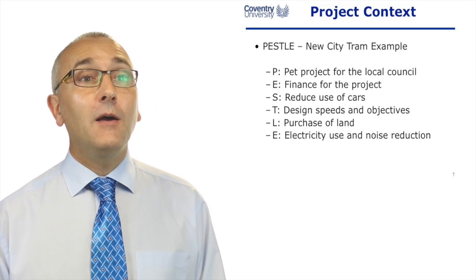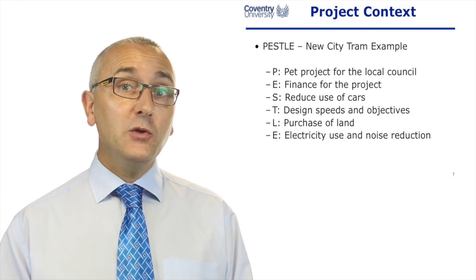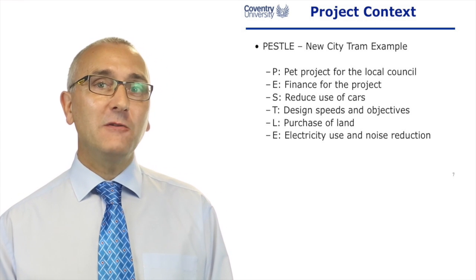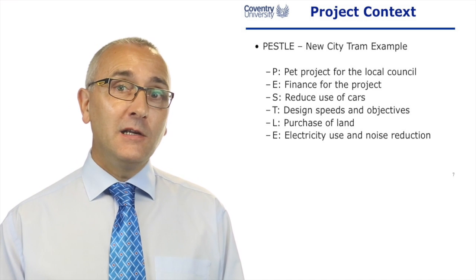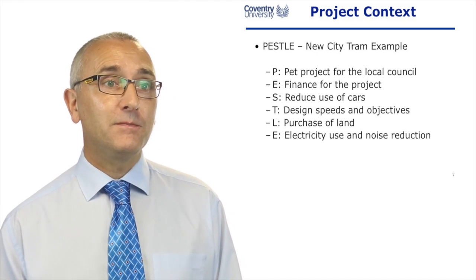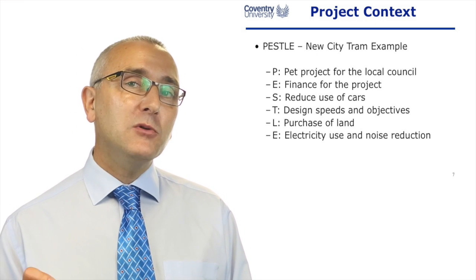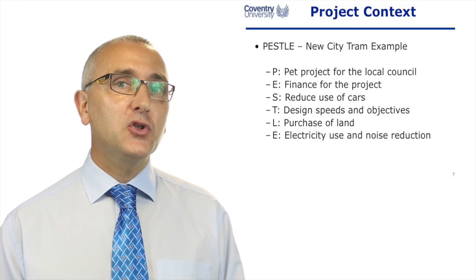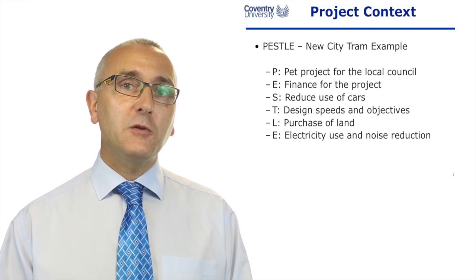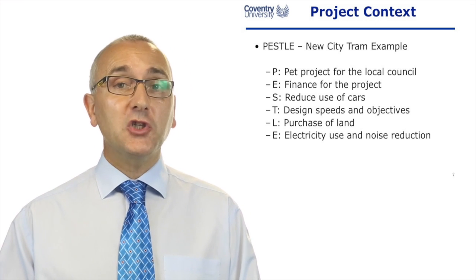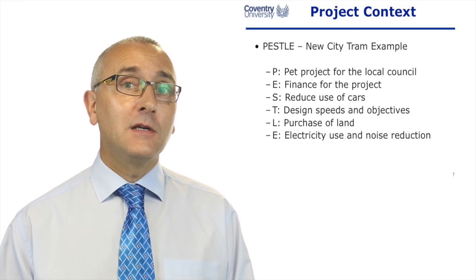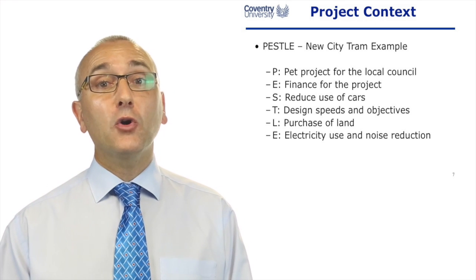Imagine you're running a project — a new city tram, for example. The Edinburgh tram system is a good example of a project that's had many problems over its life because of the environment. Politically, the local council said they wanted trams in Edinburgh — it was a prestige project for them, perhaps more than a business project to make money. Sociologically, how do you get people to stop using their cars and use public transport? Legal issues include the purchase of land. Environmental issues include reduction of CO2 emissions and car transport, but also the opposing use of electricity to power the trams, and hopefully some noise reduction in city centres. A PESTLE analysis can help you understand the project context.